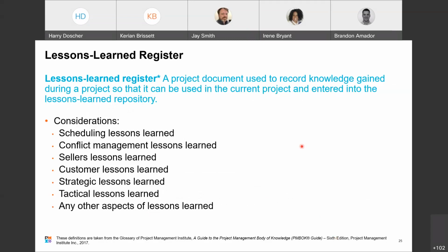Things that you can put in there are anything you learned about scheduling. If you learned that one of your offshore teams had holidays during a critical phase of the project, you can note that, and it will definitely vary depending on which teams you have engaged. I know AT&T uses teams in India and Israel, so you need to be aware of those local or national holidays in those countries.